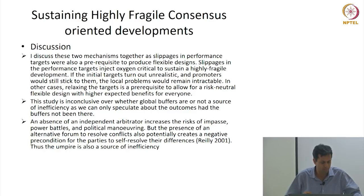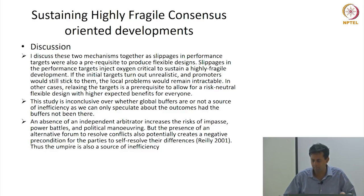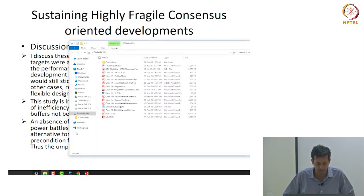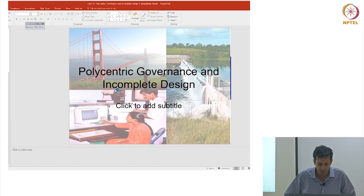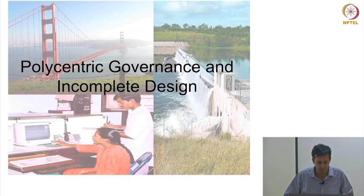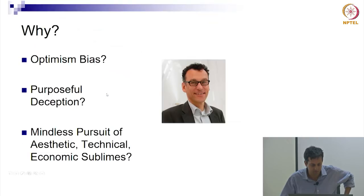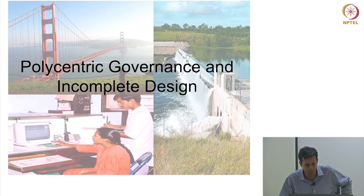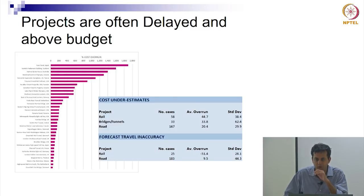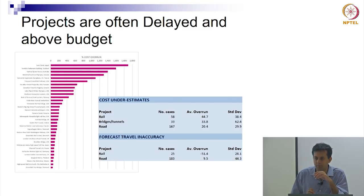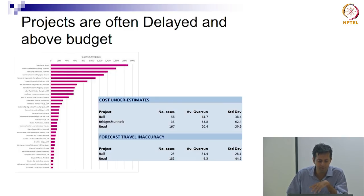A lot of information has been presented but a few threads need to be tied together on what all of this means and where nested umpires, flexible design, and all of that comes in. First, we have been talking a lot about stakeholders, but if we forget external stakeholders and just look at project performance in terms of time and cost, there is enough statistics to show that projects are heavily delayed — particularly these mega projects — and many are above budget.